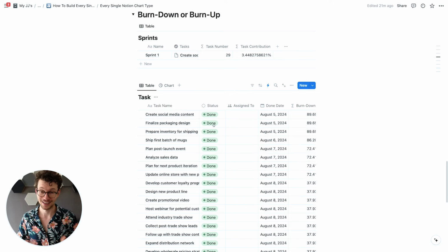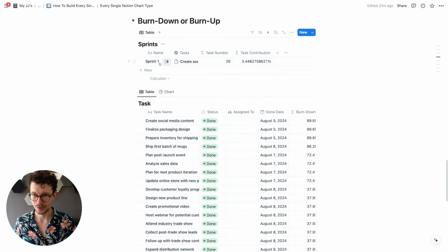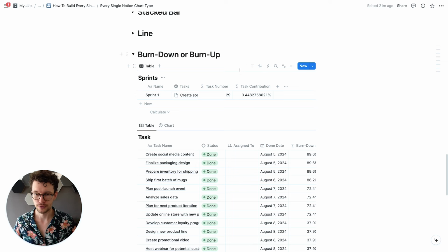The second point where this is not a perfect solution yet is when you move tasks between sprints. Oftentimes, you don't finish every single task in one sprint, and then you move it to the next sprint, and then in that sprint you might finish it. So it might have a done date later down the line, but not in actually the current sprint. And that would, of course, then lead to some wrong numbers for historic data. And there are ways to bulletproof the formulas against that, right?